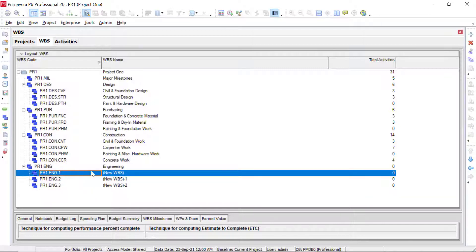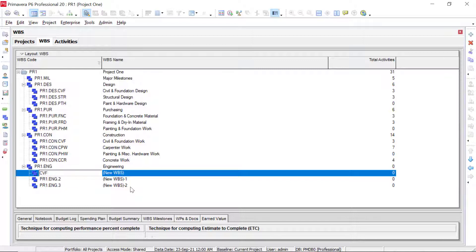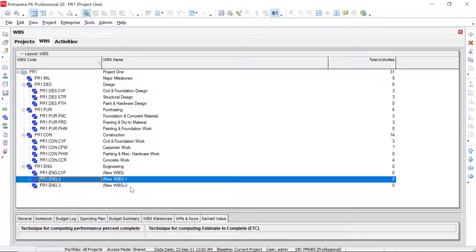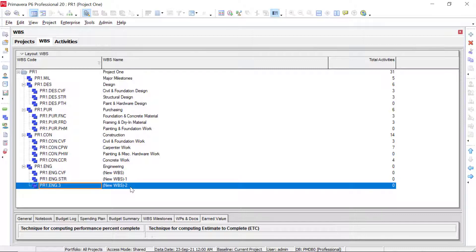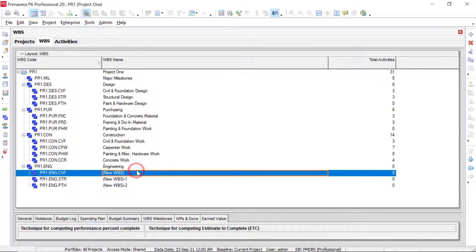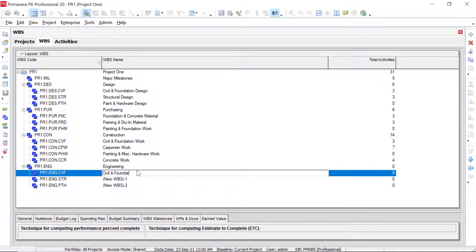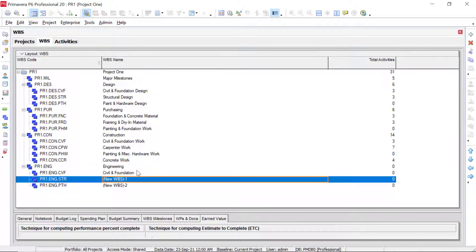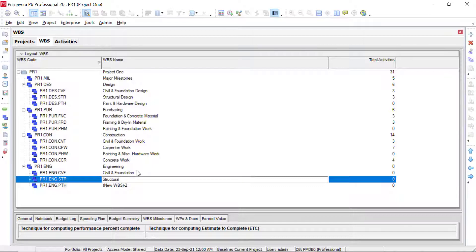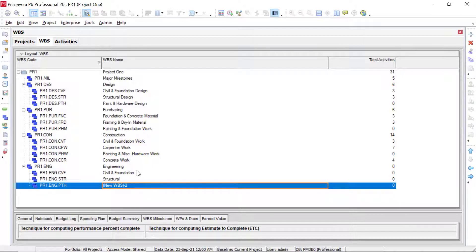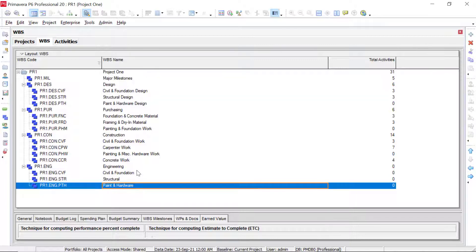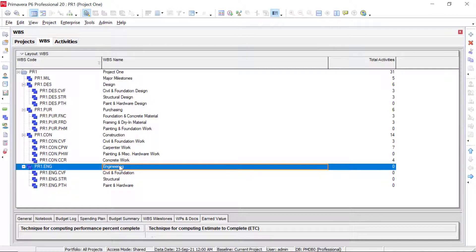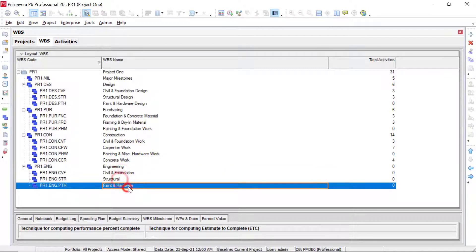So for the code, remember we don't have to retype anything. It's going to automatically create that code path for us. So we're going to have CVF. We can arrow down to the next one. This will be STR and then arrow down to the next one. This will be PTH. So this one right here will be civil and foundation. Press enter, arrow down. This one is structural. Press enter, arrow down, and then this one is paint and hardware. So now we've added in a new WBS element that is level two with our three items underneath it that are all at level three.